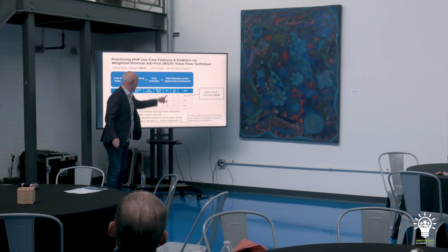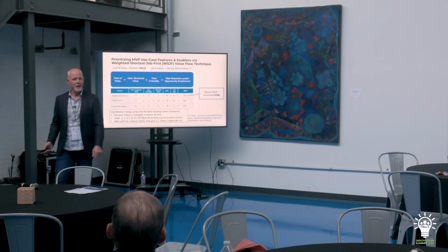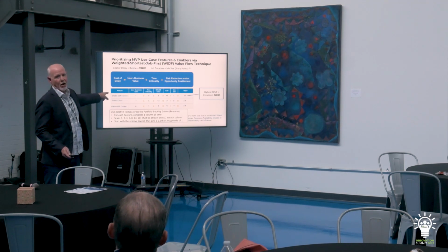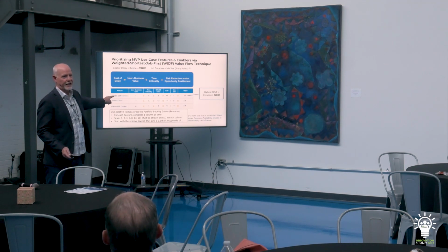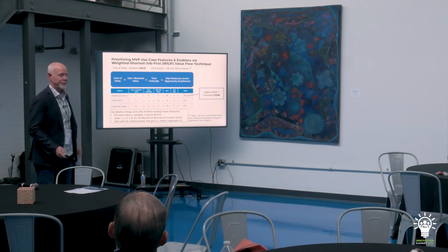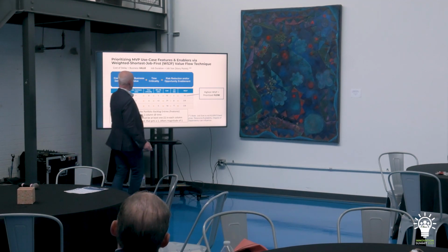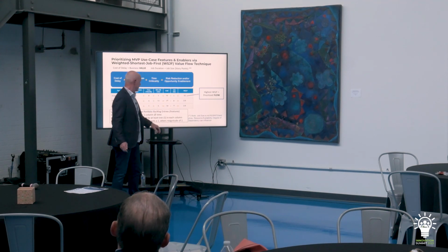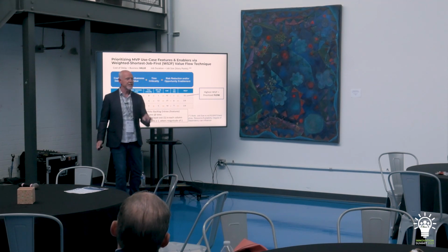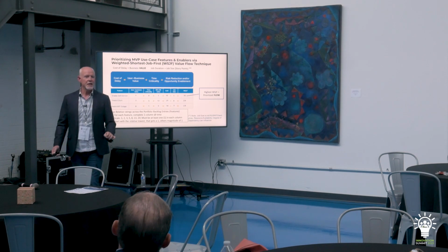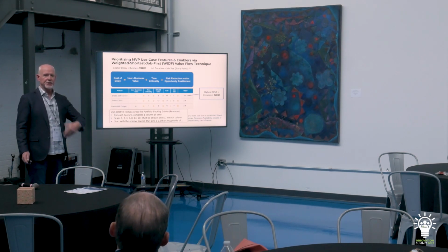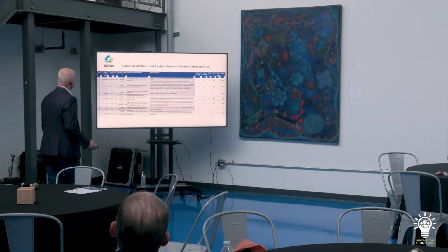These get summed together into the cost of delay. And what that means is that's the total value the business gets or does not get if you delay it. You know, so deliver it timely, right? And then you divide that by what's the effort relative to all the other efforts. What's the simplest thing with the least amount of unknowns that we can deliver? Which feature is that? That gets a 1, and then you do order of magnitude on top of it, right?